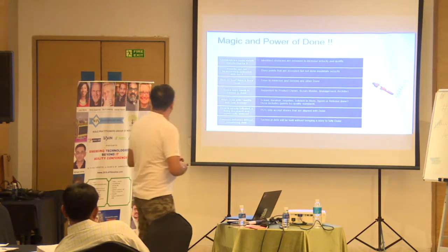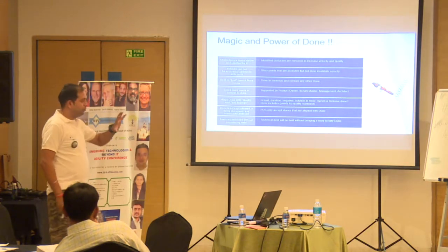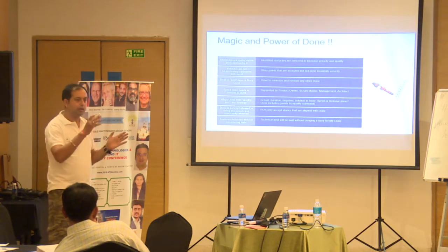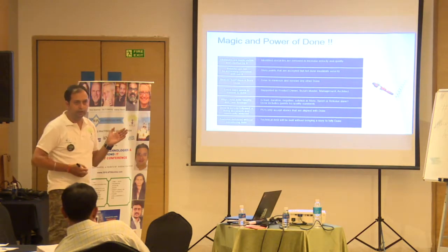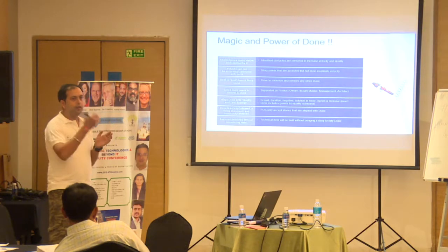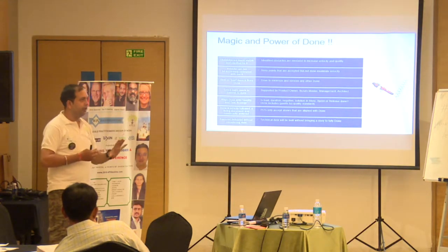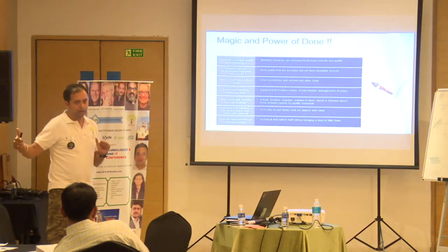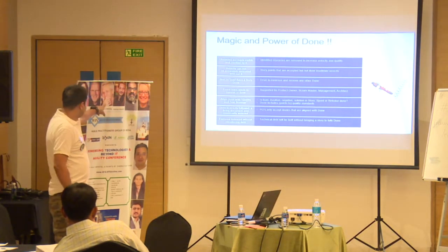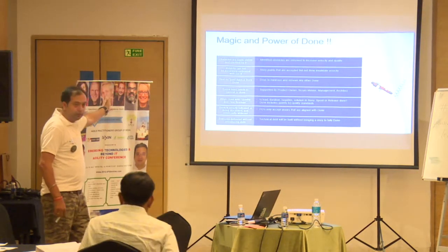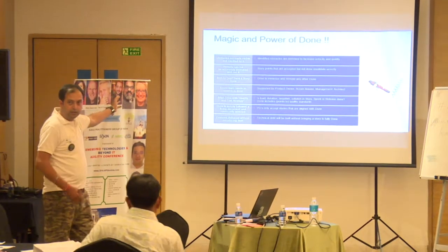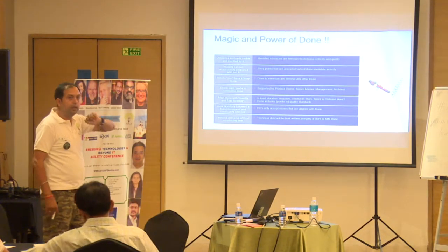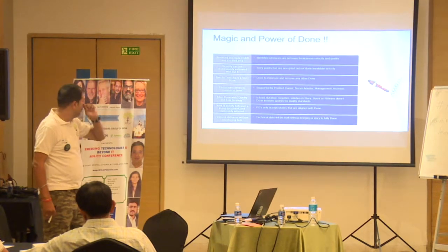The second part, like people say that my velocity is awesome, and sometimes they don't have any DoD. How can you calculate your velocity without a set defined DoD? Like you are not doing all the required part, and you are saying that your velocity is awesome. So that is another thing which I believe is a power of done. You have defined a set of criteria to complete a story. Then only you will get a real velocity if you are interested in it. Our organization is not.